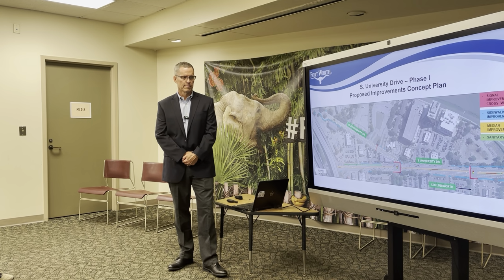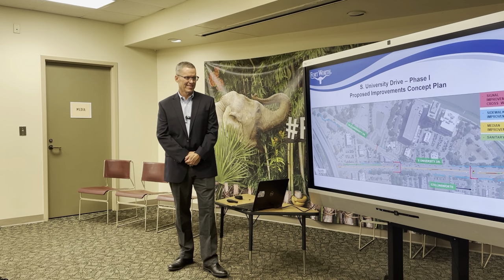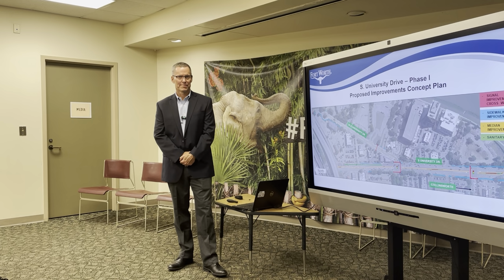We don't have a railroad crossing. We don't have that many utilities underneath. We need to talk about making sure that we do SUE on any potential conflicts. I've already told him this in a different venue. So this is not as complicated a project as West 7th was. In terms of utilities, conflicts, and potential findings while you're doing construction, it's not going to be that bad.